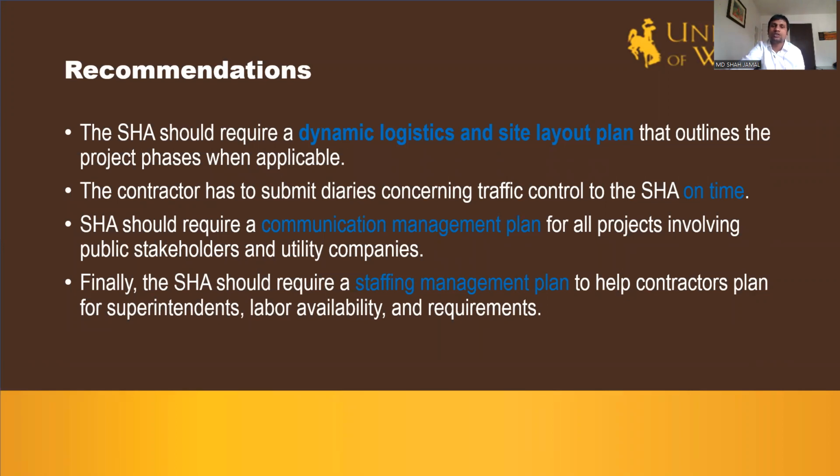The contractor has to submit diaries concerning traffic control to the state highway agency on time. The state highway agency should require a communication management plan for all projects involving public stakeholders and utility companies. Finally, the state highway agency should require a staffing management plan to help contractors plan for superintendents, labor availability, and requirements.